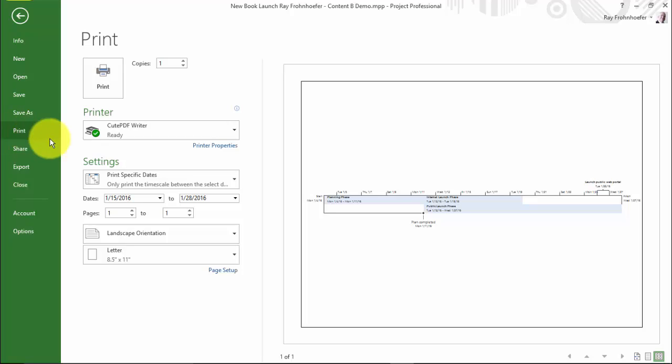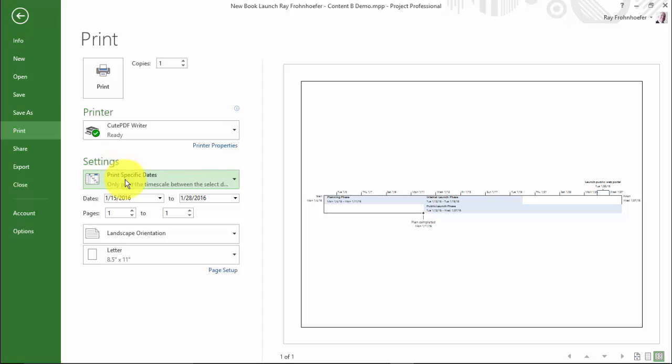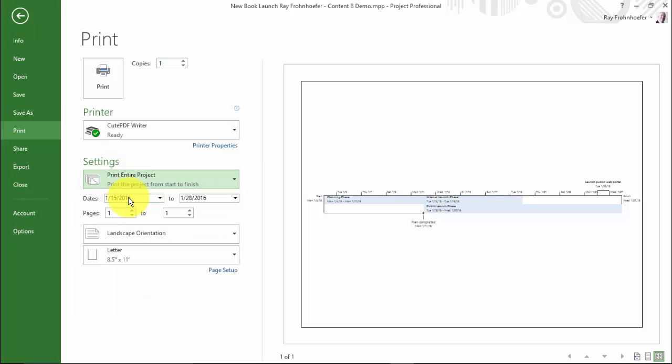I have my whole timeline. It doesn't print just specific dates. The timeline just prints in its entirety. I've got landscape orientation, and letter. It fits quite well right now on one page. So I don't have to print multiple pages.